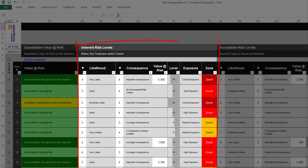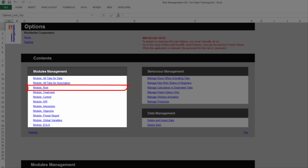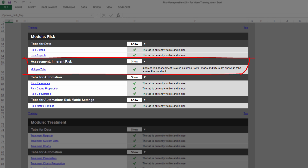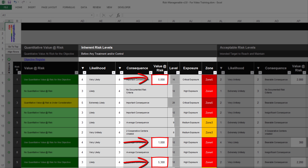The section Inherent Risk Levels is where you record the likelihood and consequence levels before any treatment or control is applied to the risk. You can choose to hide and not use this section altogether — in the Options tab, under the Modules Management section, you can reach the Risk Module section where you can select to show or hide the Inherent Risk Assessment feature. If you decide to use it, you simply select the Inherent Level from 1 to 5 for Risk Likelihood and Risk Consequence. For risks where a Quantitative Value is needed, you also enter an Inherent Value at Risk. All other columns are automatically filled up to provide additional key information.